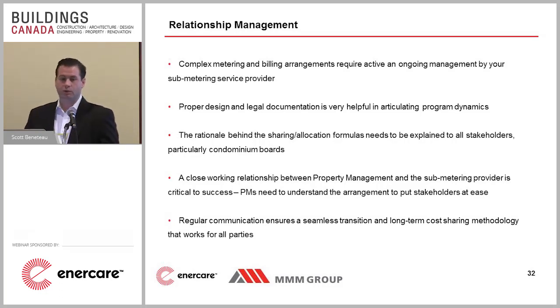and it's managed through the shared facilities agreement. The agreements with submetering providers generally are long-term, and in these mixed-use commercial developments, you have multiple commercial parties. So you do have to spend some time and consideration on how one might unravel such an arrangement should the need arise over time. And you also shouldn't forget about any of the freehold lease arrangements that are there. The leases are just as important as any other documentation, and in our experience tend to be a bit of an oversight. So when you're trying to lease a large commercial space or even some of the small mezzanine retail type spaces, it's important that the lease agreements contemplate any of the allocation and sharing formulas that you've agreed to up front.